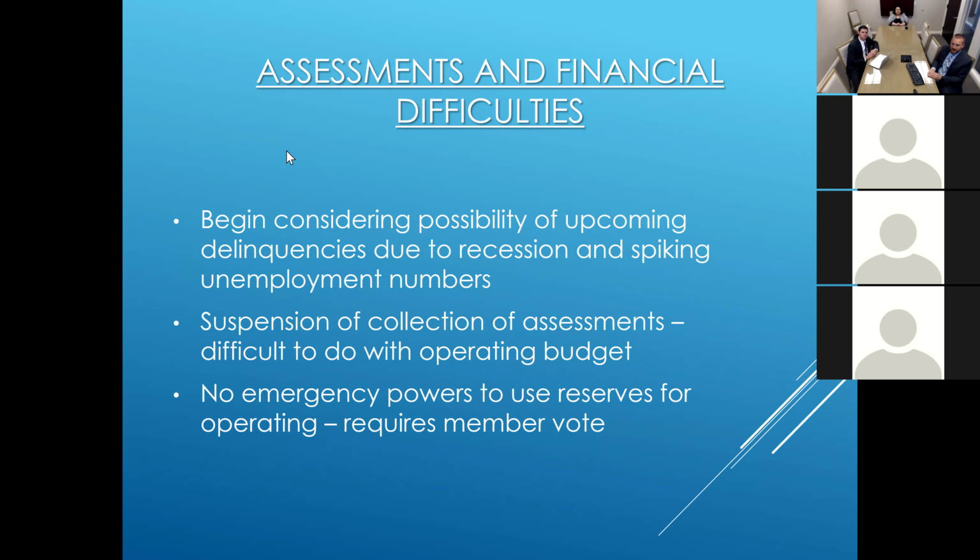I think that's obviously a concern. So you should look at that and obviously contact them and see whether or not they're in breach, or if you can terminate and maybe safely get out of that contract if you have a contract in place, and they'll go hire somebody else that still is bringing people out and conducting those services. But just be careful before you just say, hey, this person didn't show up, we're terminating your agreement, we're signing up with somebody new, when you may have had to provide some type of a cure period or a cure notice, for example, to give them the ability to fix it before you terminate the contract. That's one thing you need to be aware of before you start canceling agreements right now.